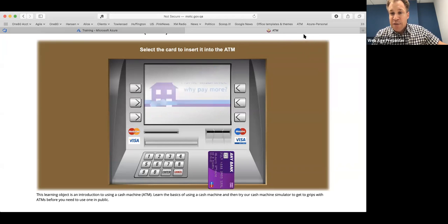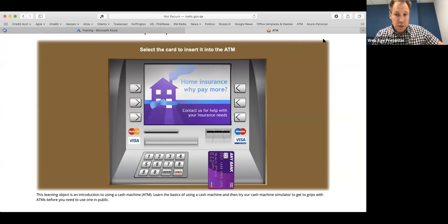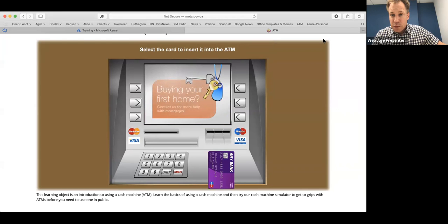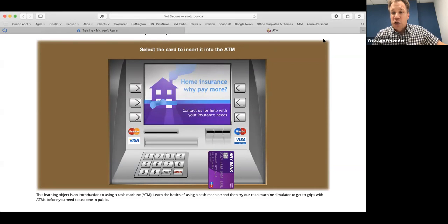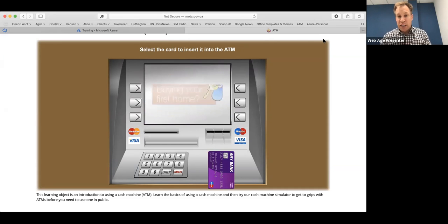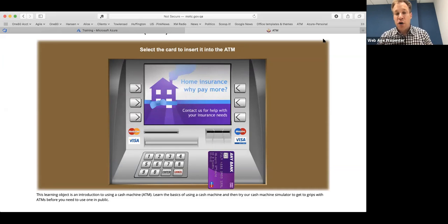Good. Tanya wrote a really good given: she's on the prompt on the ATM machine to enter a PIN. When this PIN is entered, then the user is validated as an invalid user. Can anybody see what might be wrong with the then statement here? Right, and she's answering her own question. You're not clear on what the outcome is, because remember, it's all about the customer. The customer standing there enters a PIN number and hits enter, and how do they know whether it worked or not?